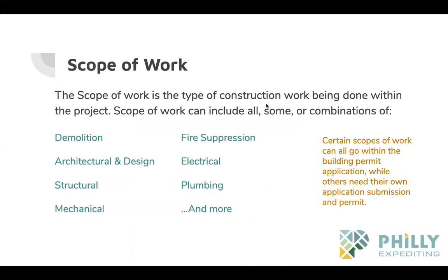Okay, we can talk about scope of work now. So scope of work comes up all the time with what we do, and it can get a little confusing if we don't understand what everything means and if different permits are needed for certain parts of the scope of work. So the scope of work is the type of construction work that's actually being done within the space, and it can include all, some, or combinations of demolishing the structure, any architectural design work, structural, of course, mechanical, which is like HVAC, fire suppression, electrical, plumbing, and of course there's a ton more.